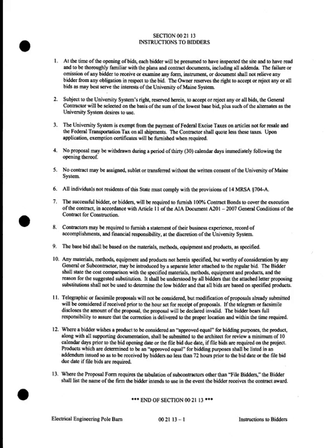We would send out an addenda. The failure or omission of any bidder to receive or examine any form, instrument, or document shall not relieve any bidder from any obligation in respect to the bid. The owner reserves the right to accept or reject any and all bids as may best serve the interests of the University Main system. We generally go with the low bid if they are qualified, but we are very specific. If they make a mistake on their bid form, we will throw their bid out. If they're late getting their bid here, we will throw them out. If they're not signed in the right spots, it'll be thrown out. Even if it's a bidder we want, we can't accept it if they don't follow the rules.